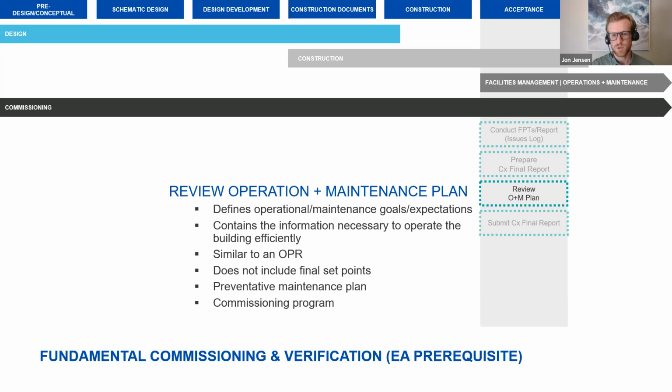And the next thing we do is make sure that all the O&M documentation has been compiled and made into an O&M plan for the operations team of the building to use as they work through the life of the building.